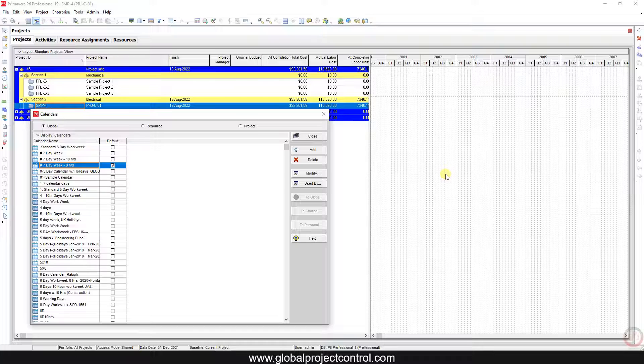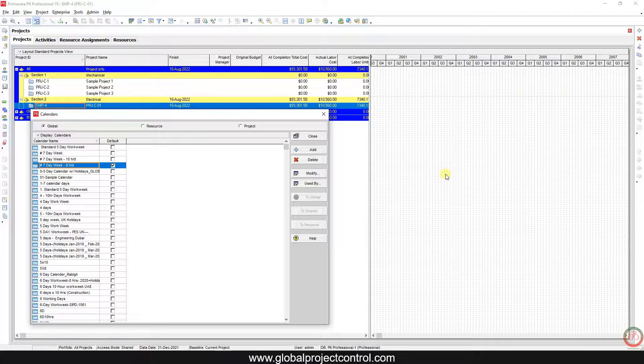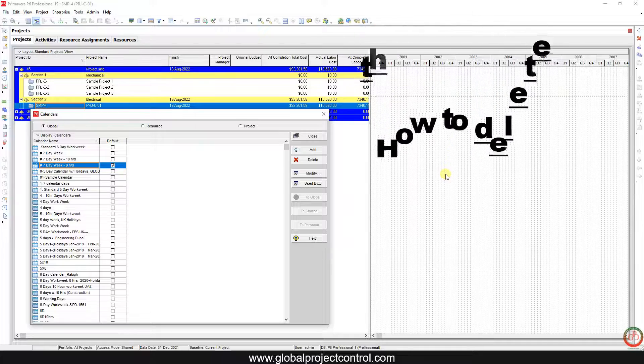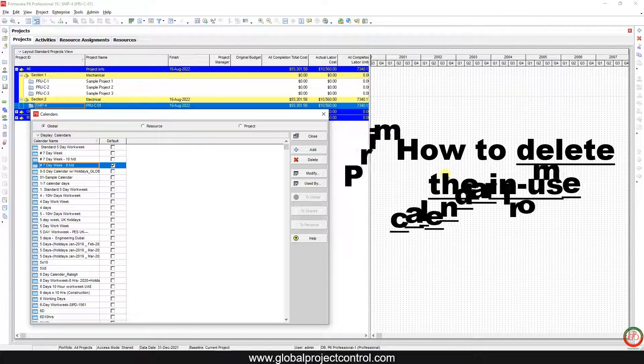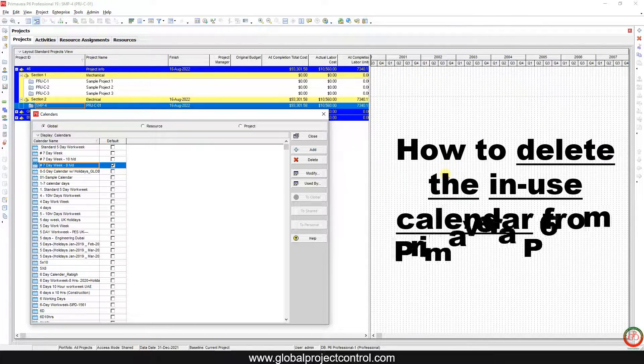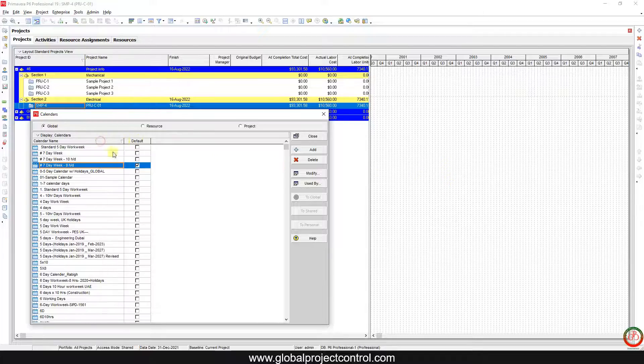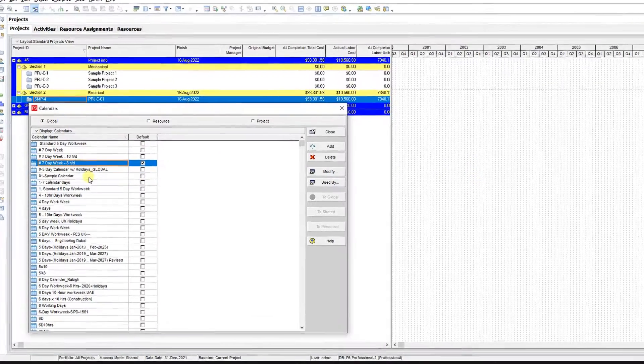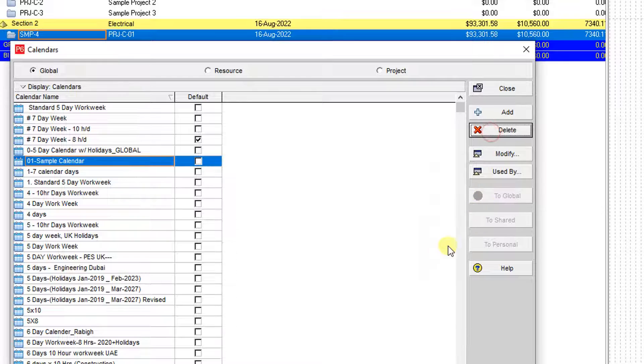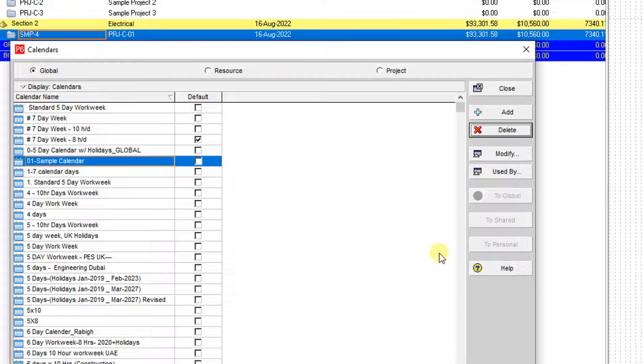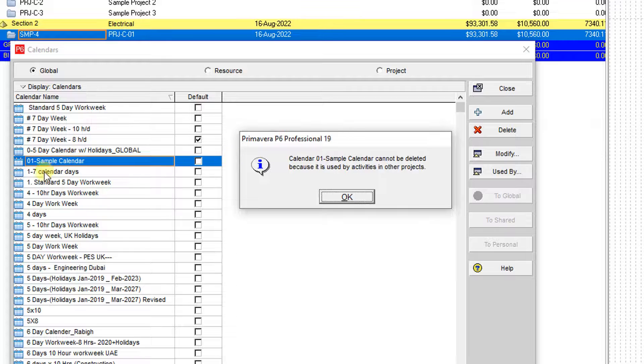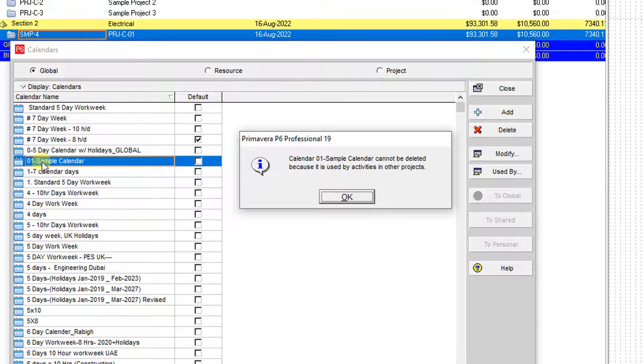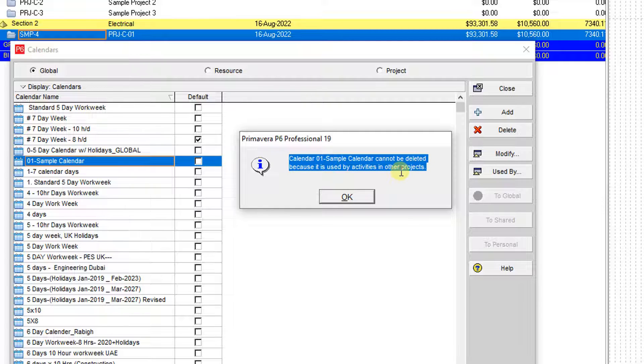Hello and welcome to another Primavera P6 lesson by Global Project Control. In this video I want to talk about: have you ever been faced with this dialog box during removing a calendar from the project? I want to remove the calendar sample but I cannot remove it. Why? Because this calendar is connected with other activities in other projects. It is in use.